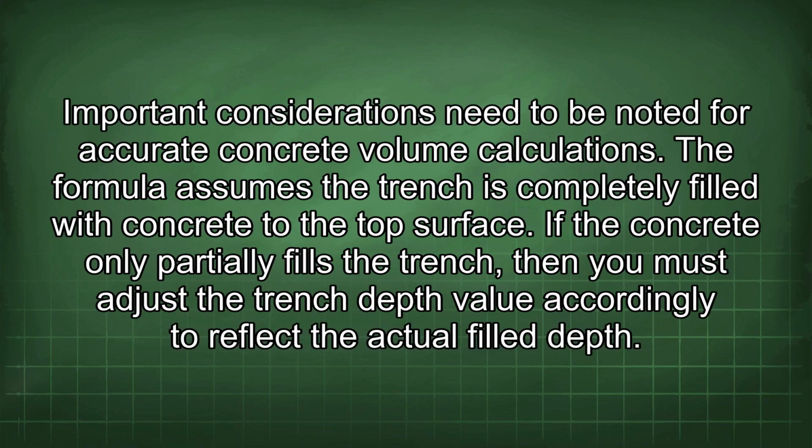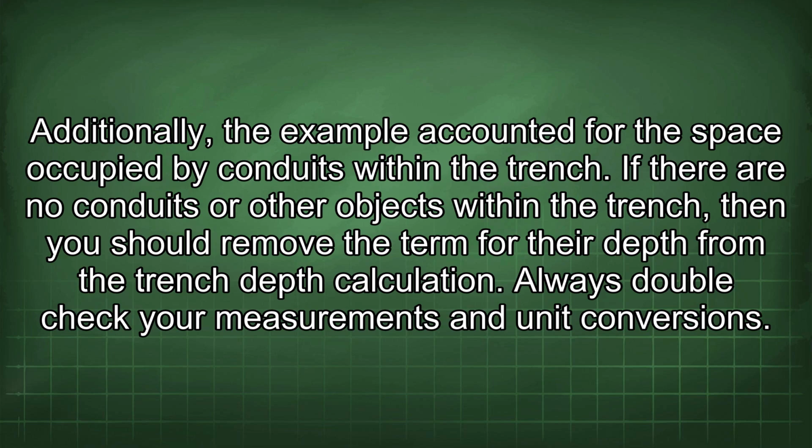Important considerations need to be noted for accurate concrete volume calculations. The formula assumes the trench is completely filled with concrete to the top surface. If the concrete only partially fills the trench, then you must adjust the trench depth value accordingly to reflect the actual fill depth. Additionally, the example accounted for the space occupied by conduits within the trench. If there are no conduits or other objects within the trench, then you should remove the term for their depth from the trench depth calculation.